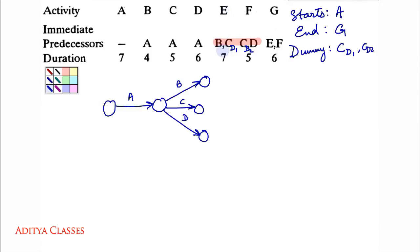Then we have E. Now we know beforehand that E is coming from B and not C rather dummy of C. So what do I do? I will take a dummy of C.